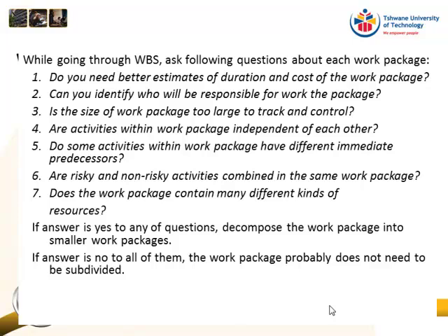Is the size of the work package too large to track and control? And that's maybe, Katlego, where your problem comes in, is that your black boxes are too large. So you don't get enough feedback often enough on your black boxes to know where are we now. Does that make sense?